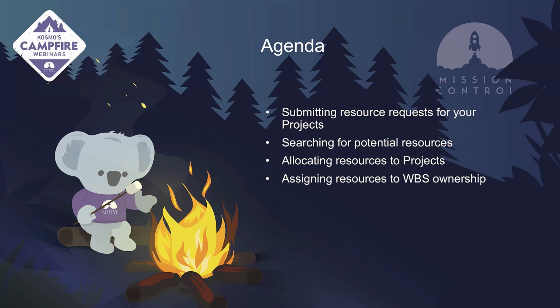Once the appropriate resource is found, they can be assigned to the project either by generating role forecast, or you could also transfer the ownership across the project. So you could replace somebody that's already assigned with this new role. This is particularly helpful if you're using placeholder roles. Let's say you've cloned from a template and you need a consultant here. A request has been submitted for a consultant, and then that gets actioned on, which then gets replaced throughout the project level through that ownership transfer process within the resource request component. We'll go through that demo in a bit.